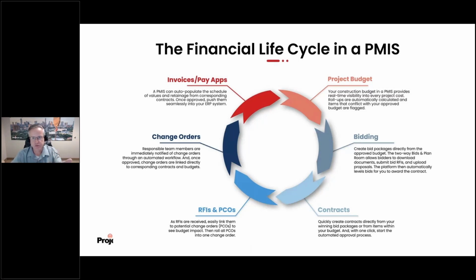And that could be initial stages of a budget as you're working through those different iterations during the planning stages. You can establish an approved budget for that particular project down to the level of granular detail that your organization wants to track information. From a budget, a bid could be established. And typically what that is taking, say, line items from the budget as an online job costing sheet that can then be provided to the bidders that are bidding on projects.